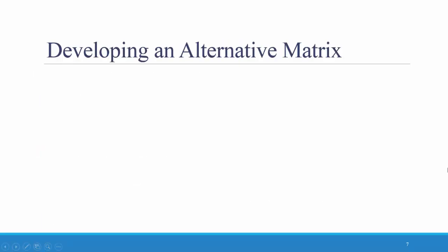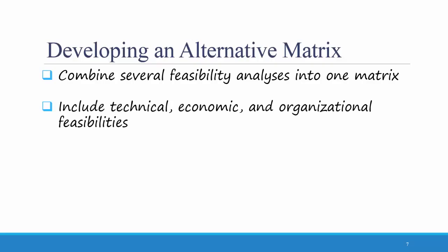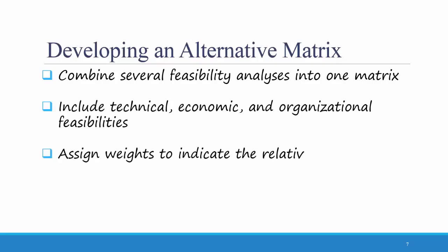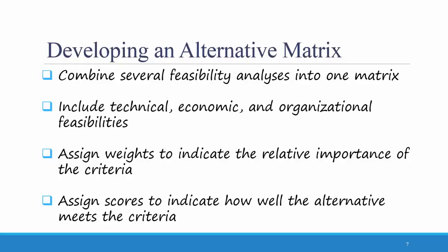If you're having trouble deciding on an acquisition strategy, one tool that might be helpful is an alternative matrix. An alternative matrix combines several feasibility analyses into one matrix. It includes technical, economic, and organizational feasibilities. For each criteria, you assign weights to indicate its relative importance to your organization. Finally, you assign scores to indicate how well the alternative meets the criteria.